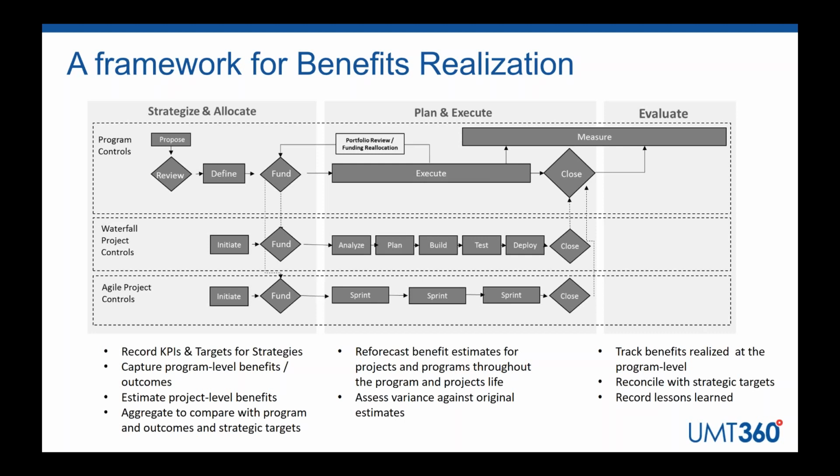One of the things that most organizations are not good at is then, in plan and execute, continually revisiting those benefit estimates and reforecasting the benefits of the projects and program throughout the life, much like they reforecast cost throughout the life of the project and program. So go beyond just capturing benefit estimates to help receive funding for programs and projects, and continually evolve the benefit estimates or forecasts through the life of the project to ensure you're still delivering on projects that derive the maximum value.